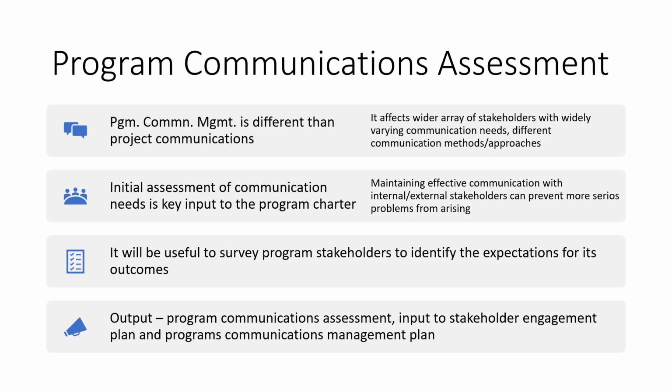The output of this program communication assessment is the report on program communications assessment. It will be an input to the stakeholder engagement plan. Based on this assessment, you can further develop the stakeholder engagement plan, which will be useful in the planning phase. It will also be an input to the program communication management plan.